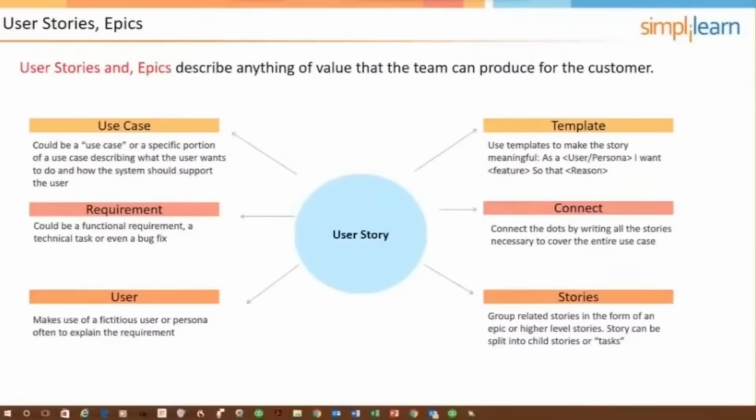User stories can be estimated in story points or ideal days. Most teams favor story points. They might start with ideal days, but they will usually end up going to story points. Tasks are estimated in ideal time, which is usually hours.